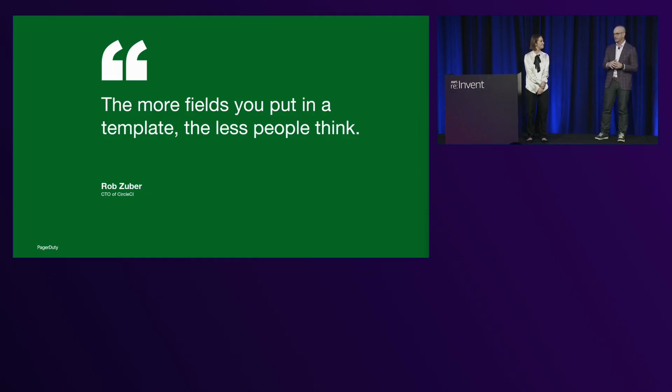And to your point of what went well and is 20 minutes good or not, there was a period where we had a cost of incident in our post-incident template. And people would fill it out and give multiple decimal places on the penny, but miss entire categories of cost, right? It was like, these 3 engineers showed up and we project their salary to be X and therefore it cost us this. What about the partners and the customers and the sentiment and the apology tour that we had to go on, et cetera? Each one of those is orders of magnitude bigger. And I think you need to get people out of the weeds of those specific boxes and back up to think about the big picture.